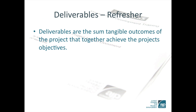There are two different types of deliverables: management and product. Typical management deliverables will be the terms of reference, the project plan, and the communications plan, whereas product deliverables will be the component parts required to deliver the objectives. Deliverables are tangible, measurable and descriptive.